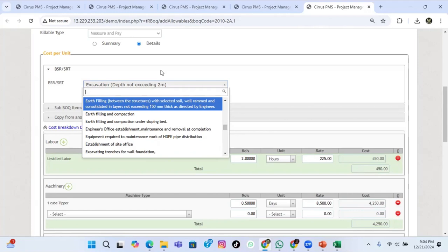So like that, here we have different stages. In the tender stage, we have one BOQ, then the working BOQ, we detail it, and the tender BOQ will not be the same as the working BOQ. The working BOQ will have more details. Sometimes the working BOQ is called the budget BOQ as well. The profit margin will differ from the original tender BOQ. Usually only top management can see the tender BOQ. The working BOQ, site staff can see.